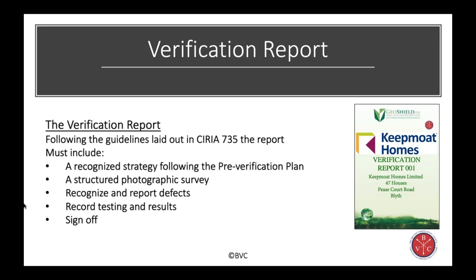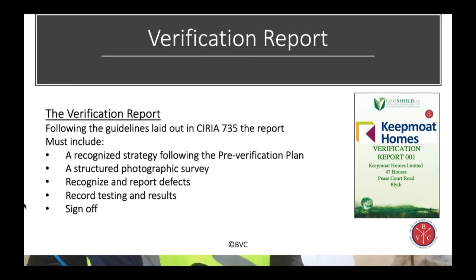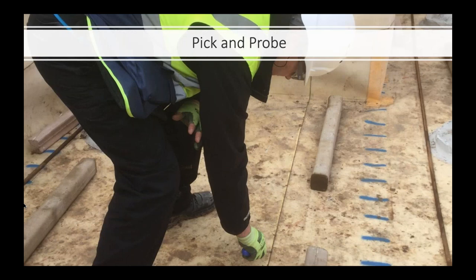All those are put in the report. You might have five reports which don't necessarily cover the whole site, dependent on the risk — we may only do 50% of the site, depending on the method statement and risk assessment. In Scotland they are more towards 100%. In England, there are set tables in CIRiA 735 which show you the percentage based on whether you are using a specialist or a ground worker, or the type of construction.